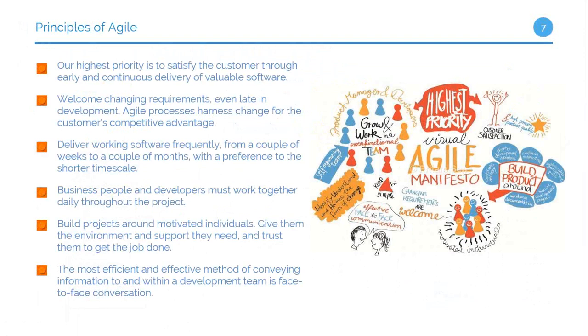"Can I have this software?" Now, on the flip side of that, welcoming requirements, as they mentioned here, is good, because people are not only going to want to add things, they're also going to want to remove things. However, when we talk later about tales of woe, this notion of welcoming changing requirements also invites the notion of welcoming a changing timeline and a changing budget. Some things we have to consider, because many people do Agile development within a very waterfall funding and requirements world. So we'll talk through some of that as well.